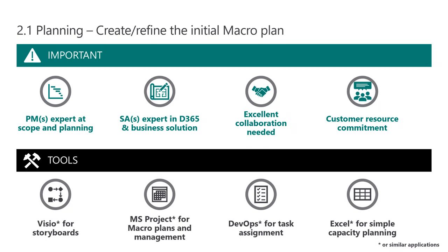So for storyboards, start with basically getting bits of paper, sticky Post-its or whatever onto a wall as you plan it out within a workshop environment. Once you've got something that looks like it is the right answer, put it into Visio for distribution and for a more permanent record, or use a tool similar to Visio. If you have a favorite drafting software, use that instead.